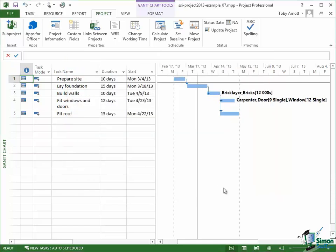Now you may have noticed a slight change to the schedule and the slight change is because the resources that are currently scheduled to work on the standard calendar, that's basically the bricklayer and the carpenter, because their calendars are still based on the original standard calendar will not be fully available to this project during the hours of work on this project because they still have as their calendars the eight to five hours whereas the building calendar is on the nine to six hours.